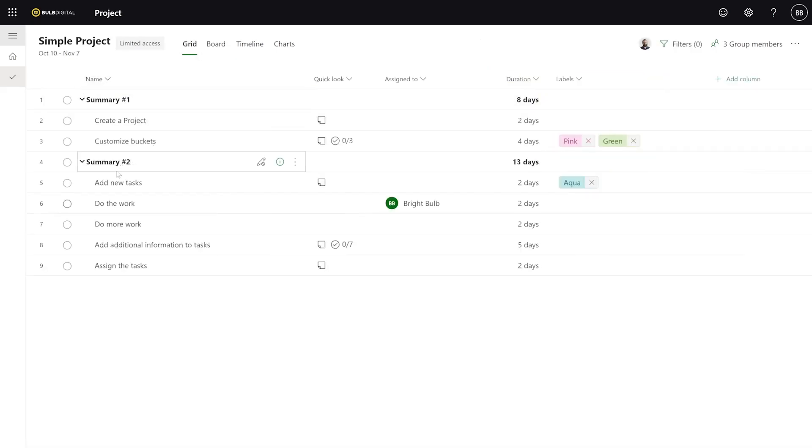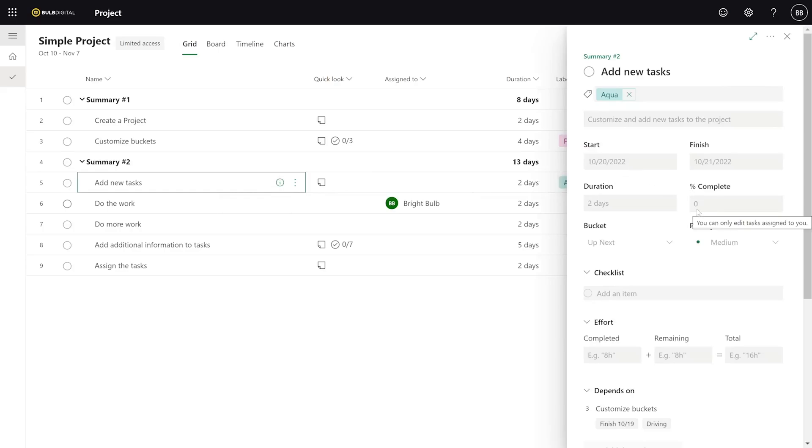Without any additional licenses, users can go in and actually provide feedback and interact with you. What they can't do — if I wanted to go update someone else's tasks, I can't do that. I can't mark them complete, I can't change the percentage complete. I can view the information about it, but that's all I can do. In addition, I can't create new tasks or move tasks around. Any of the editing features of a task besides marking it complete or the percentage complete — a user can't do those unless they have a full license of Project for the Web.